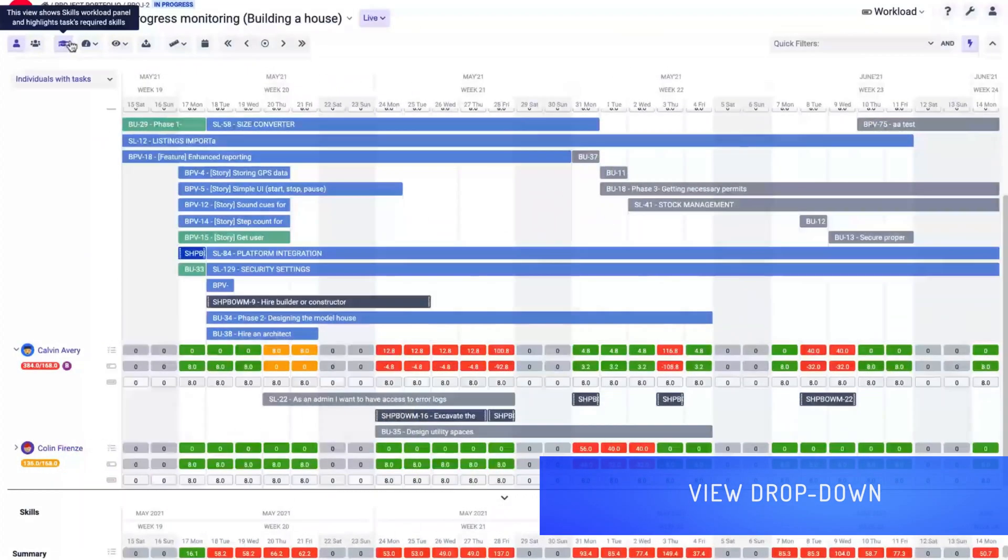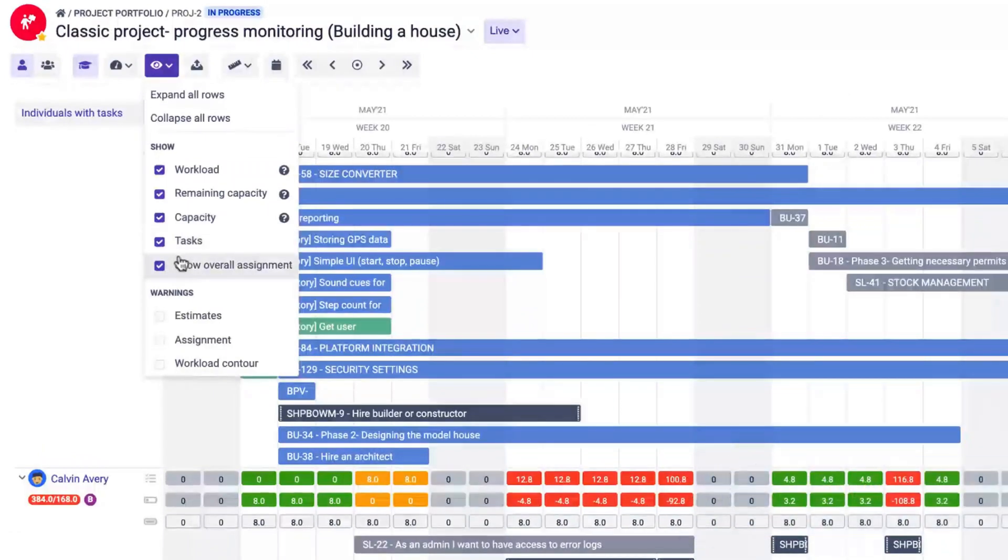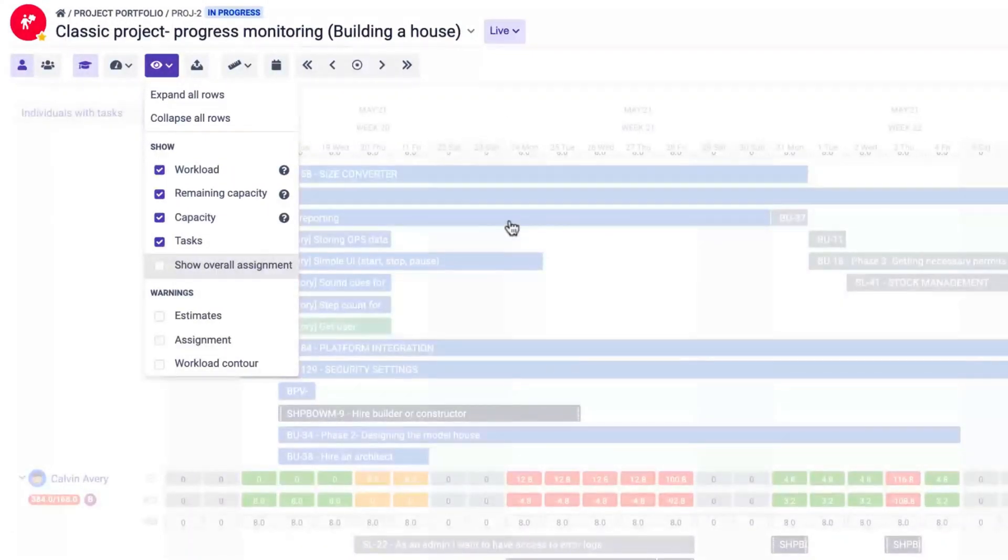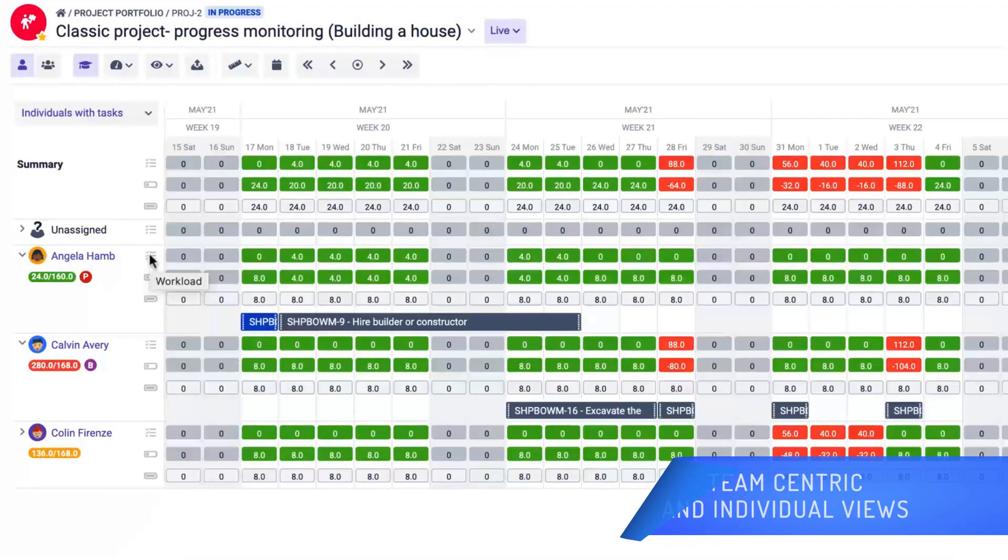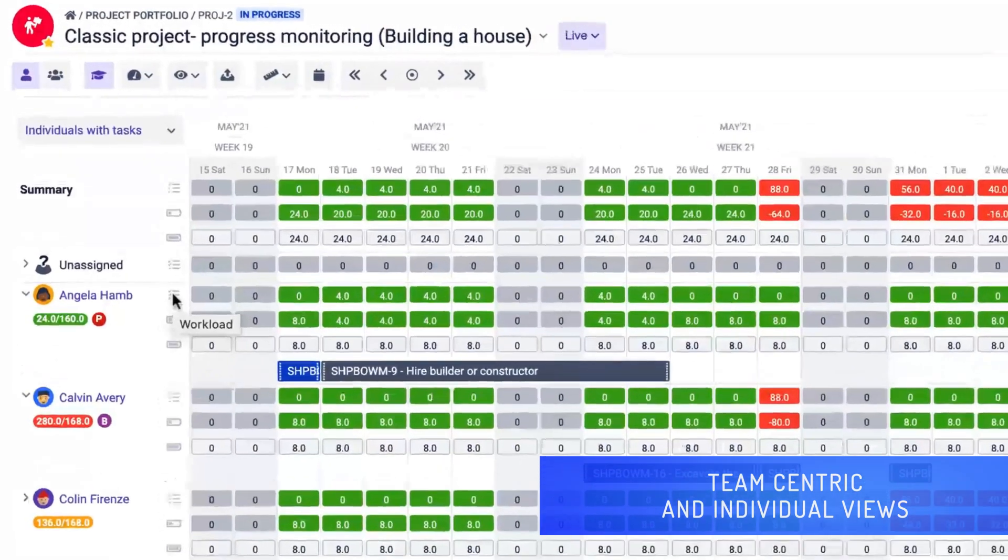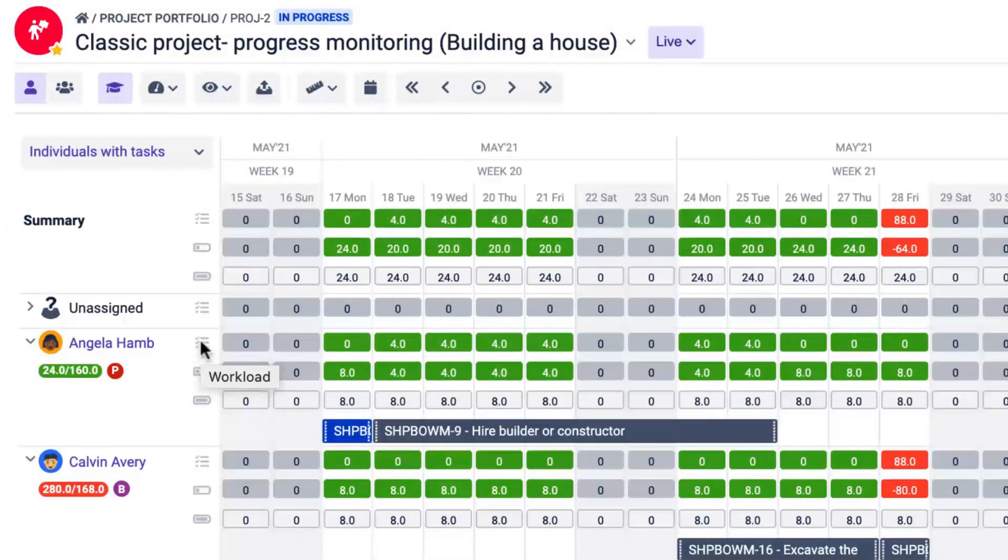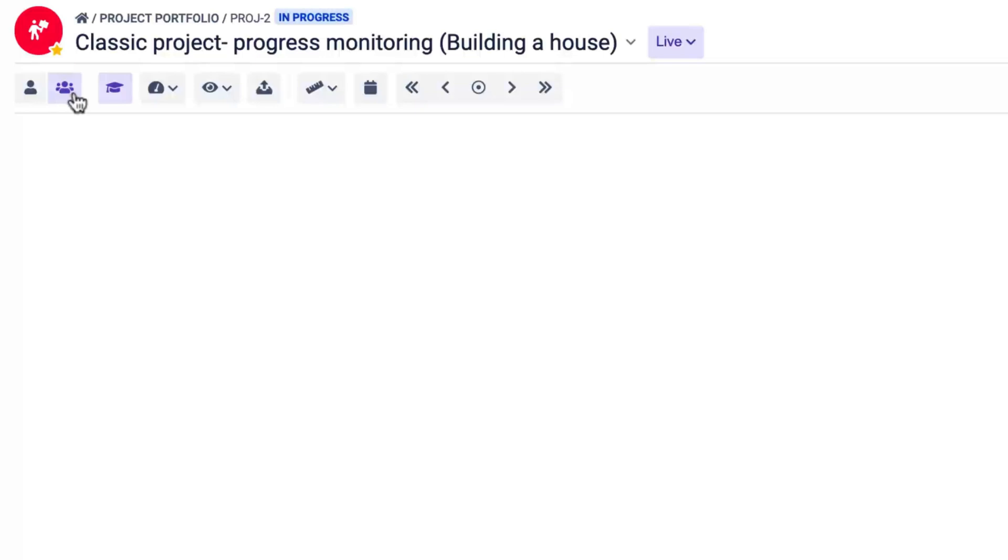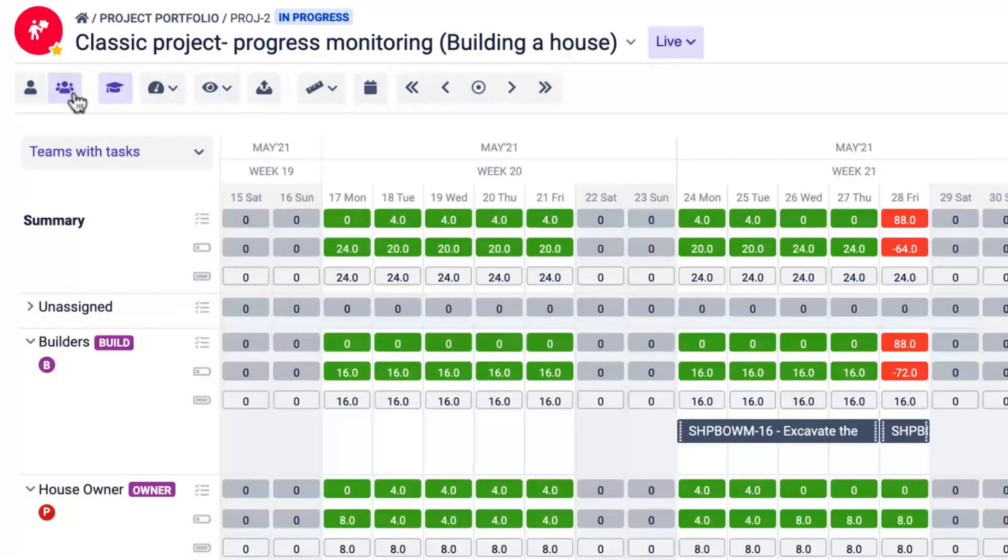Click the view drop-down to choose which information you want to see on the resource grid. You can switch between the individual and team-centric views. The capacity of the team is equal to the sum of capacities of its members.